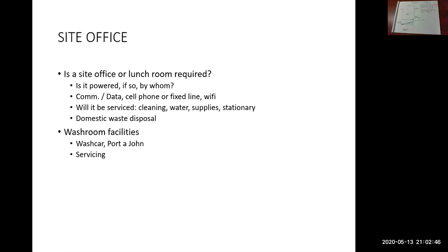Servicing of the site office. It needs to be cleaned. You need to have potable water, so drinking water. You need supplies, the desks, filing cabinets, and all that stuff. And garbage disposal. All of those things are costs for a site office.